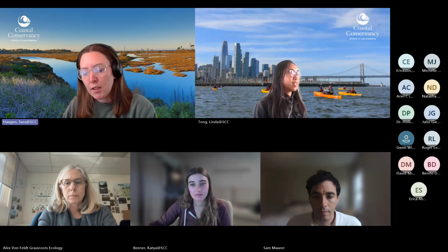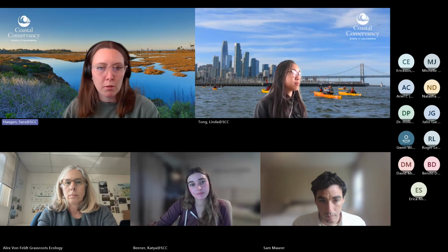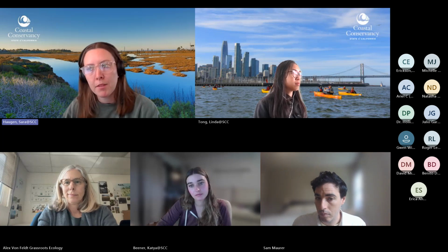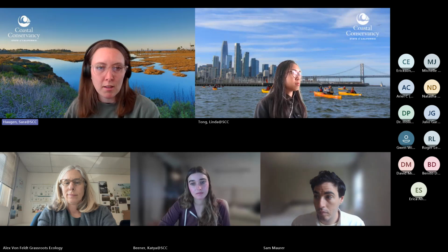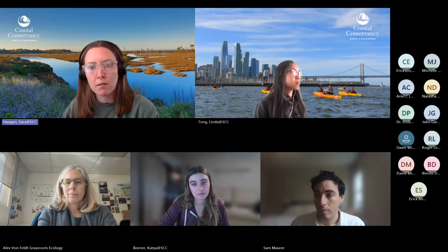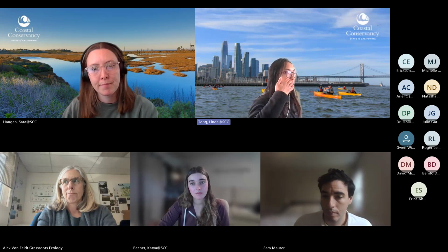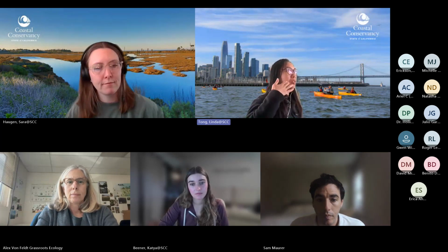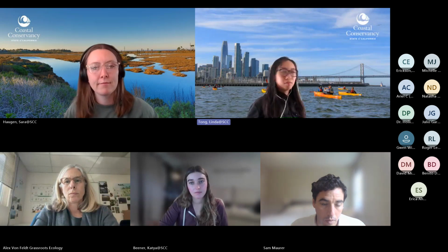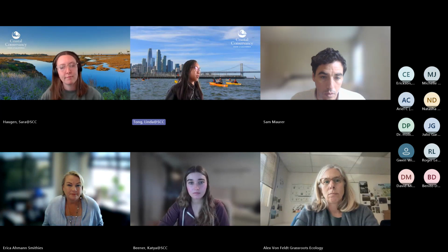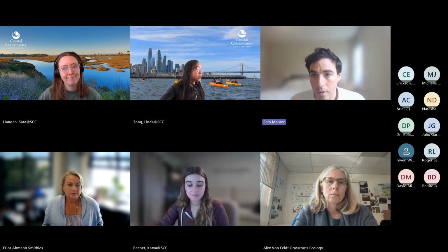Thanks for coming. And I'll also mention, it's okay if you don't know everyone you're planning to work with when you make the work program. We can approve subs as we go. I usually make a document with a list of approved subcontractors that goes in tandem with the work program, so it's flexible. You can just email your grant manager and say we plan to work with this subcontractor, brief qualifications, what they'll be doing, and then they can be approved by email. Okay, great. Thanks.